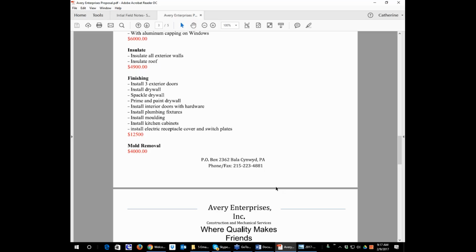However, I'm going to need to reorganize your scope of work into 35 different categories of improvements, and I'm going to reapportion the amounts that you have put on your proposal into those 35 categories.